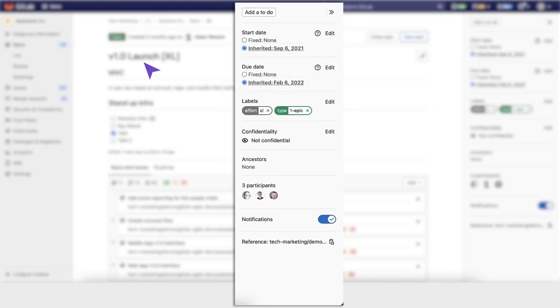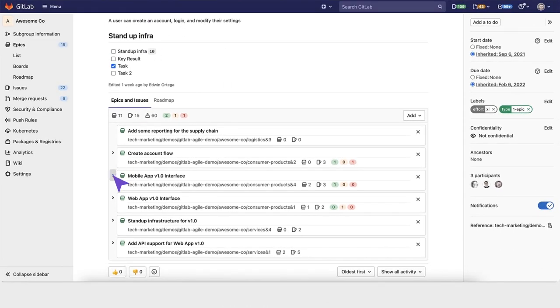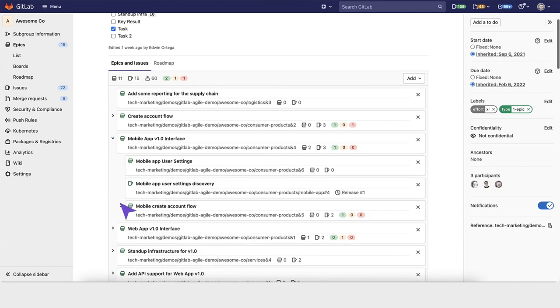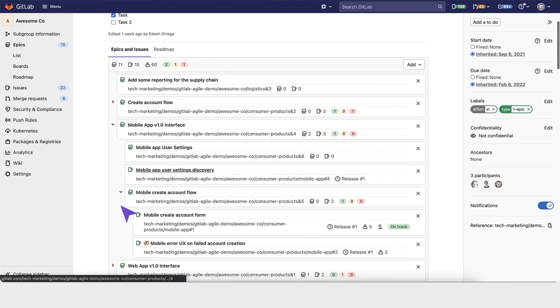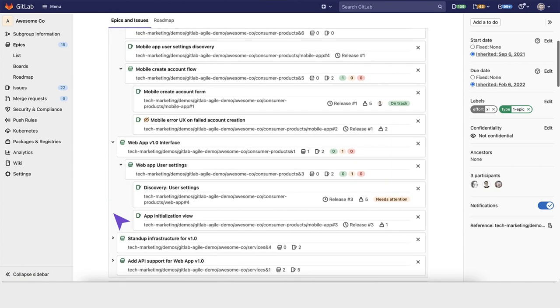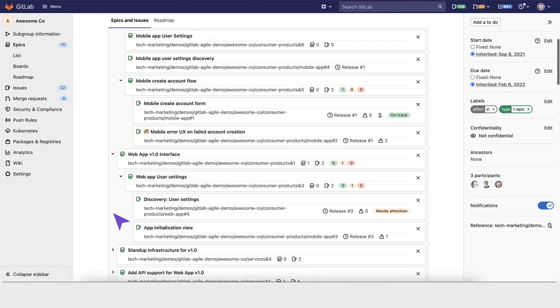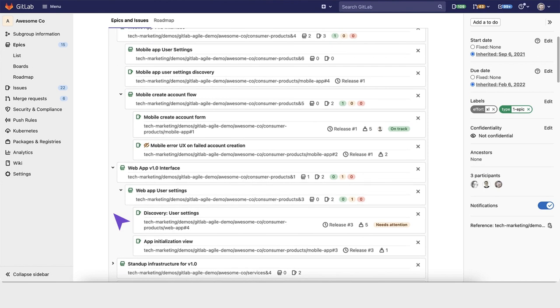Inherited dates work like this. GitLab will scan all of this epic's issues down to the lowest level, determining their tasks, maintenance items, bugs, and stories.